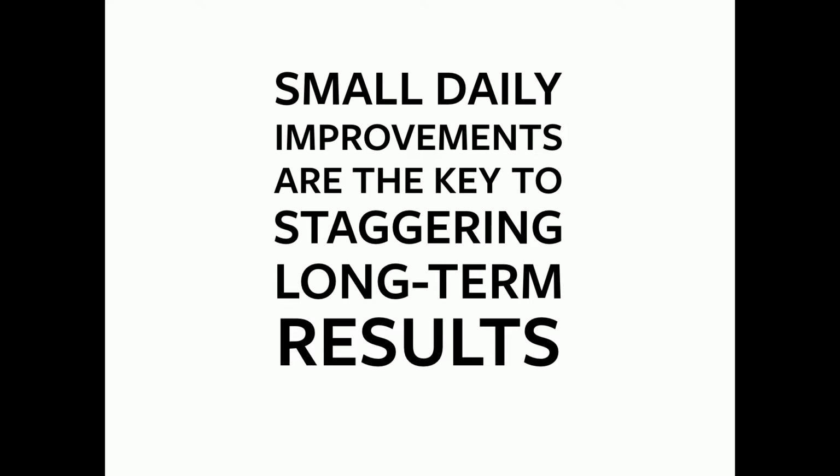So finding small areas to make changes that have the largest impacts are going to be the biggest gains you'll see. And the example of that is that first proof status. It was a small change that we were able to add to the process that didn't affect everybody else. If they didn't need that first proof status, they could still go through that process without even having to look at it. But it helped provide that clarity where we needed to.